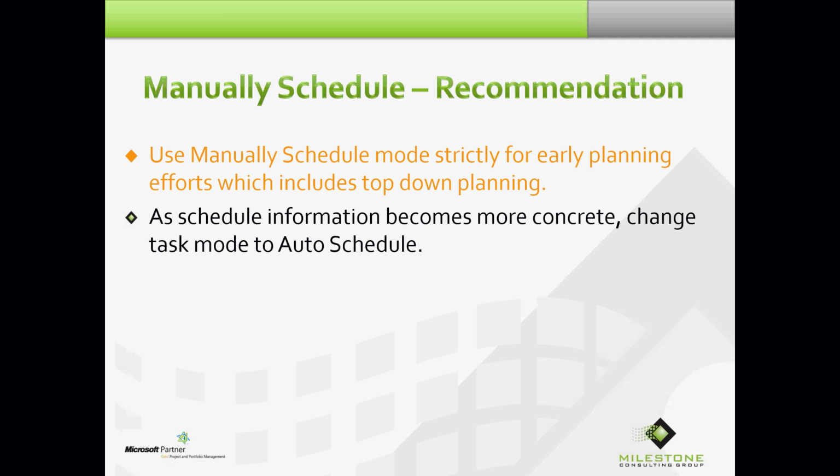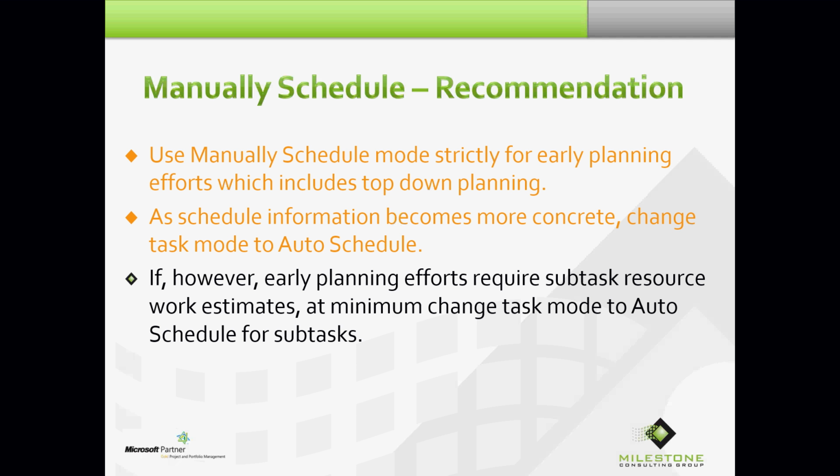And then as schedule information becomes more concrete, and it looks like you're going to take this project on, I would always recommend changing task mode to auto schedule, because to me that's where the true horsepower and flexibility in Project lives. If, however, your early planning efforts require subtask resource work estimates, at minimum, change task mode to auto schedule for subtasks.